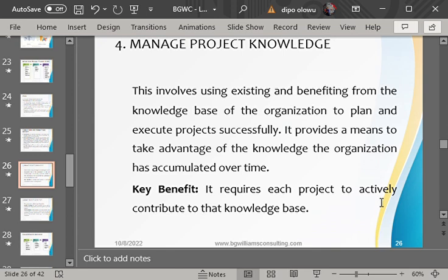Then, when the project manager gathers that information, puts it in a report or a document and sends it to some stakeholders, it becomes work performance report. Hello, did you get that analysis?